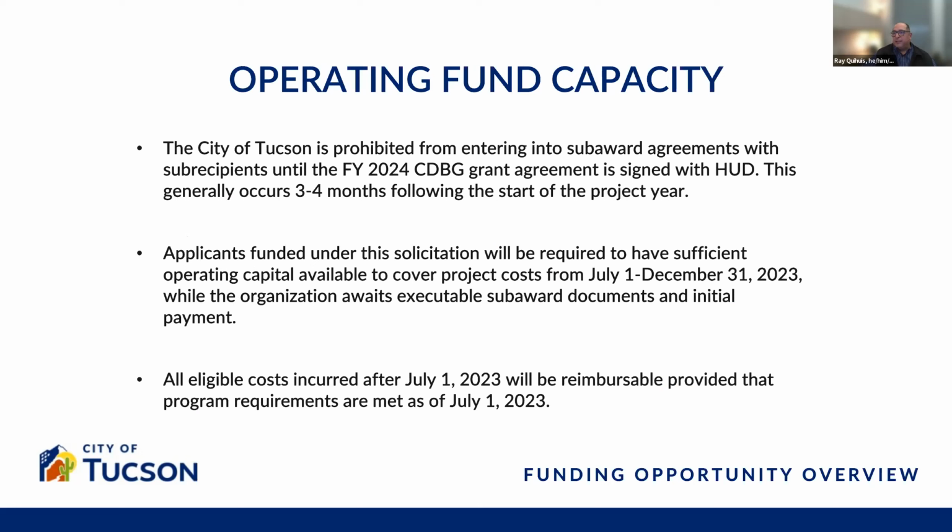Operating fund capacity. The City of Tucson is prohibited from entering into any subaward agreements until the fiscal year 2024 CDBG grant agreement has been signed with us by HUD. This generally occurs three to four months following the start of the project year.